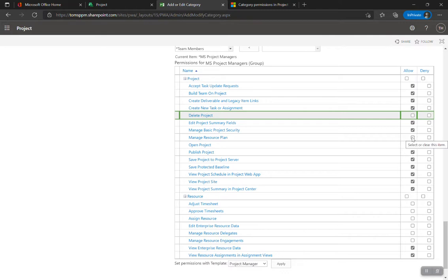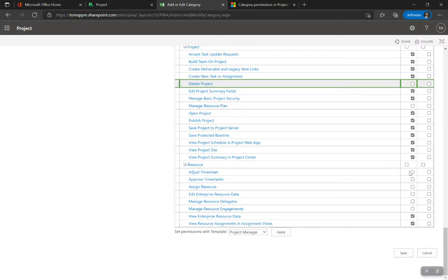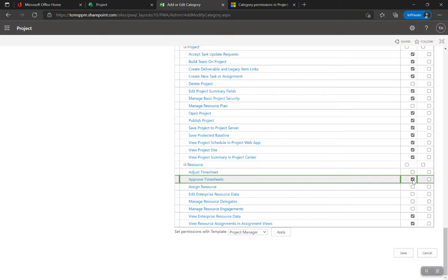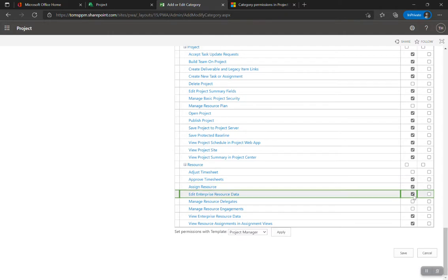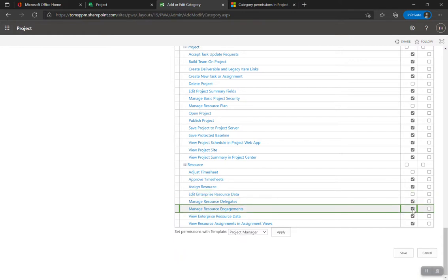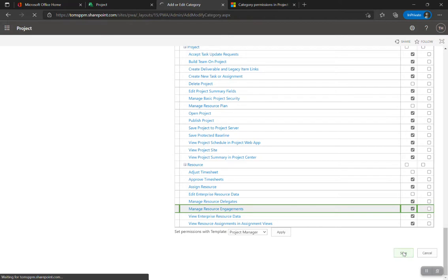Open projects, publish — yes. Resource plans — I'm not going to get into granular settings; read the documentation. For resource-related permissions: adjust timesheets for resources — probably not. Approve timesheets — yes, probably. Assign resources — yes. Edit enterprise resource data — probably not. Delegate and engagements — yes. Note that out of the box, Project Online assumes a resource manager role separate from project managers, but in most cases project managers also handle resource management unless you're in a matrix organization.